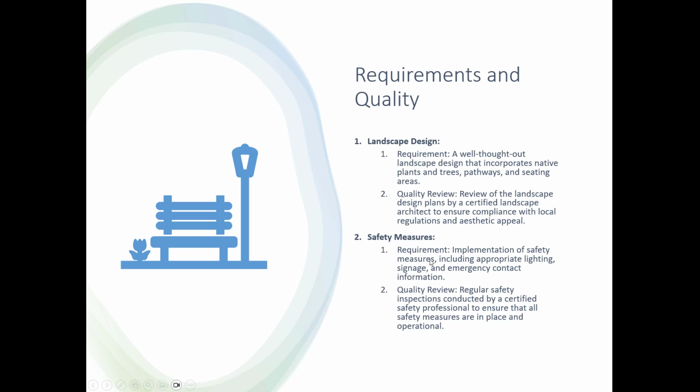For safety measures, the requirement is implementation of safety measures, including appropriate lighting, signage, and emergency contact information. This would be throughout the park. And for our quality review, while this is ongoing, regular safety inspections conducted by certified safety professionals to ensure that all safety measures are in place and operational.